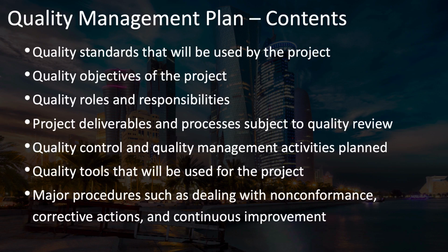Quality objectives can be about the deliverables, such as how long it takes to load a web page or to generate a report. Quality objectives can also be about the project activities, such as air quality or noise levels at a construction site. Or they can be about the project management processes, such as how often deliverables need rework, how quickly issues are addressed and resolved, or overall stakeholder satisfaction with the process. Or, of course, the traditional measures of delivering the agreed scope on time and on budget.